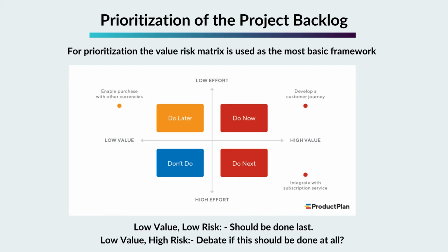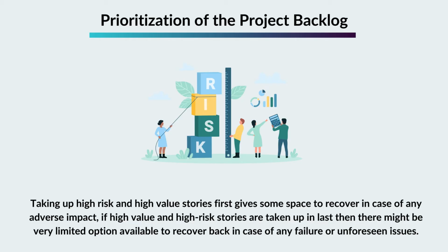Taking up high risk and high value stories first gives some space to recover in case of any adverse impact. If high value and high risk stories are taken up last, then there might be very limited options available to recover in case of any failure or unforeseen issues.